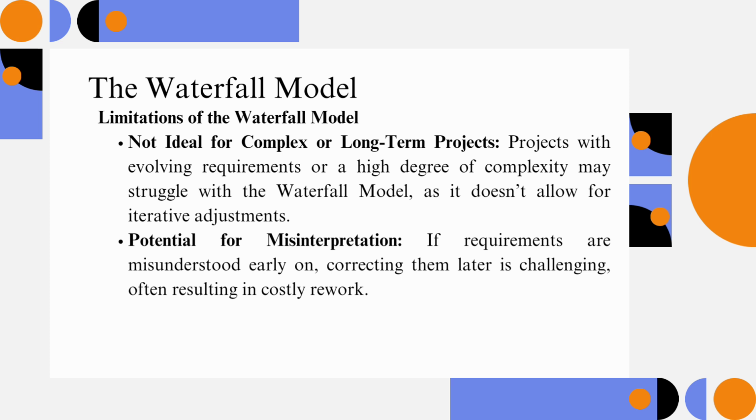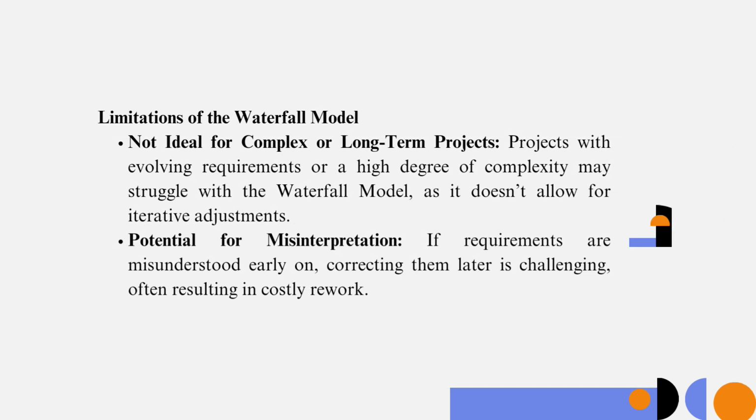Not ideal for complex or long-term projects. Projects with evolving requirements or a high degree of complexity may struggle with the Waterfall Model, as it doesn't allow for iterative adjustments. Potential for misinterpretation. If requirements are misunderstood early on, correcting them later is challenging, often resulting in costly rework.